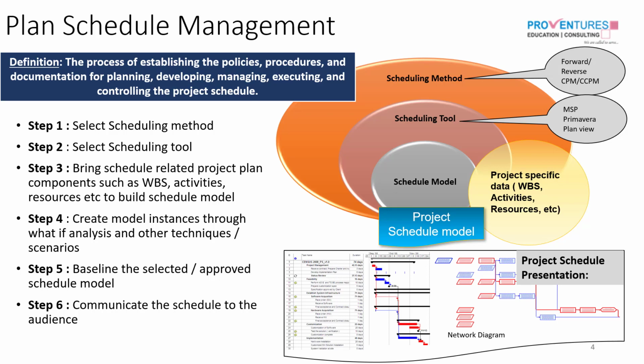So when you begin a project, you need to first establish what kind of scheduling method you are going to follow. If the project is an event-oriented project, like let's say an Independence Day, then the end date is fixed. You have no way to change it. So then the schedule should come from the end date. We call it reverse scheduling. Any other project in a business environment will follow the forward scheduling. That means you set a start date and then schedule towards the projected end date.